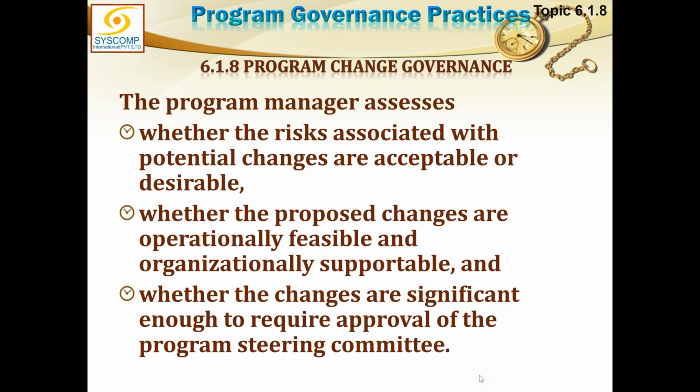Whether the risks associated with a potential change are acceptable or desirable, whether the proposed changes are operationally feasible and organizationally supportable, and whether the changes are significant enough to require approval of the program steering committee. If it is at a low level, it is within his power. It is about just putting one and one together from different projects, then probably he has the authority to deal with such type of changes.